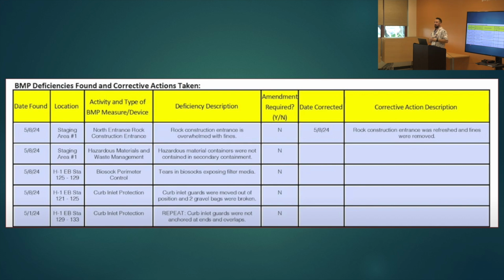Maybe you issued an LD for that particular thing, and you just want to add that comment, or maybe there were extenuating circumstances where the contractor couldn't get it corrected in time, and you're willing to grant them an exception based on X, Y, and Z. You just want to make sure that all the data is in these forms.